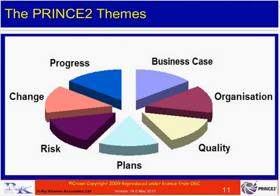For example, the business justification principle is supported by the business case theme. The business case records the reasons for doing the project — the benefits, disbenefits, timescales, costs, etc. — allowing us to compare what we are investing against what we will get out of it. In addition, the risk theme supports continued business justification: if the level of risk increases, the justification may no longer be valid, in which case we either prematurely close the project or change direction.